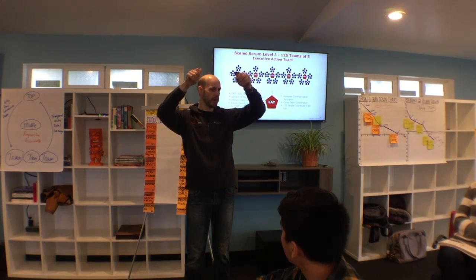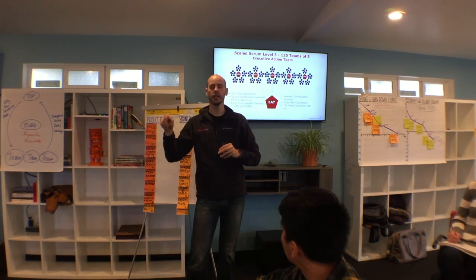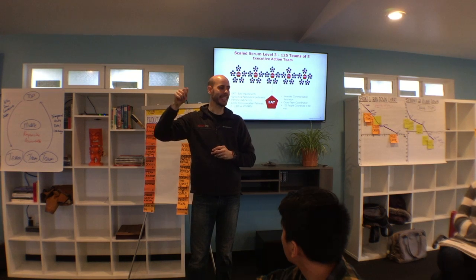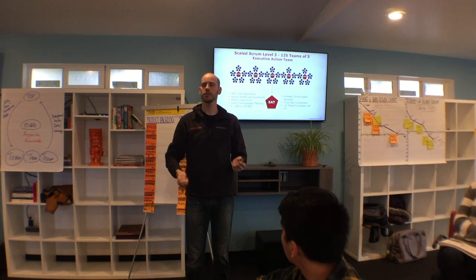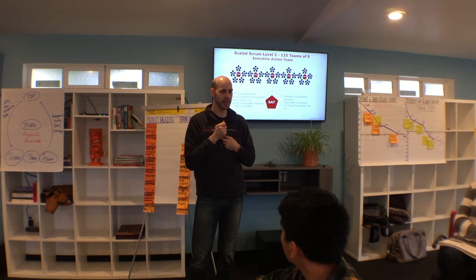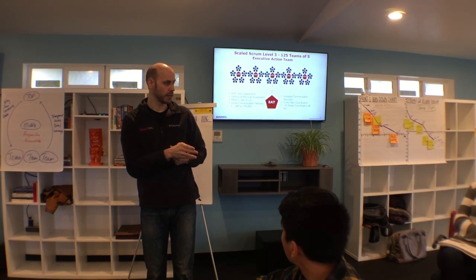They can't solve it right now. Either no one has room to work on it, and we'll talk about how we assess the room later in the interrupt pattern, or no one can. They don't have the authority. It requires signatory authority from higher up in the organization. So whoever has that impediment is one of the 5 people that goes to the next Scrum of Scrums.